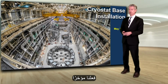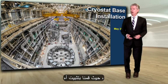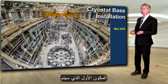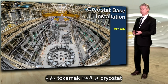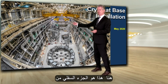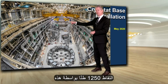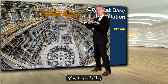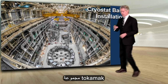So what have we been doing recently? Much of this now is just from about the past year, maybe a little bit more, where we have been doing installation. The first major component to be installed in the tokamak pit is the cryostat base. And you see that right here. This is the bottom of that thermos that I said India was putting together. So that 1,250 tons picked up by these overhead cranes and transported across so that it can be deposited in the tokamak building in the tokamak pit.